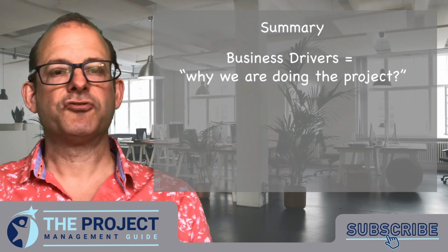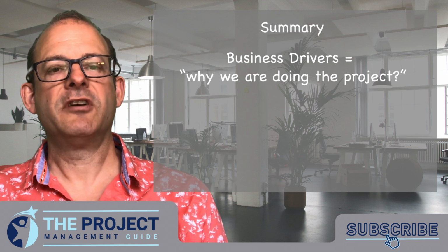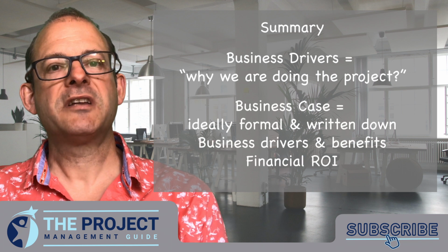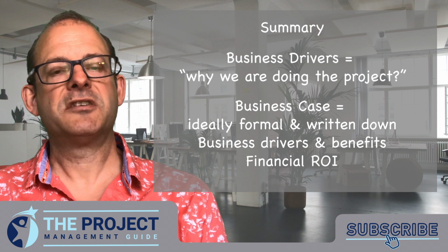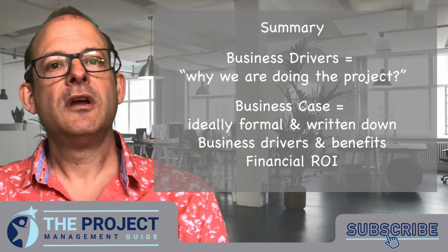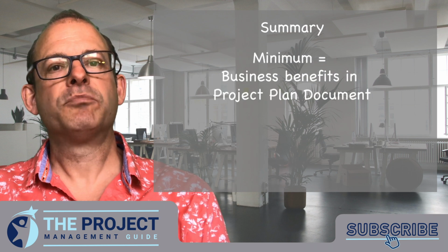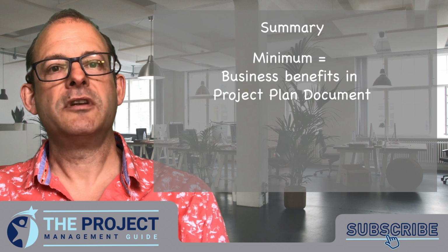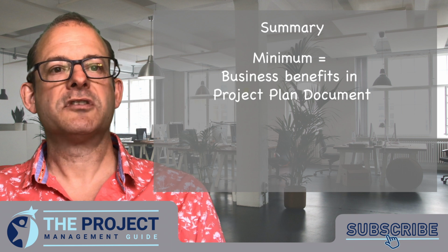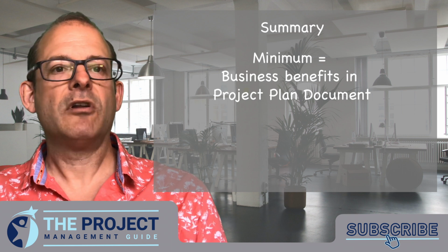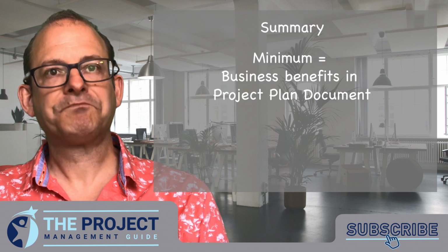So understanding the business drivers for your project is really important. It's all about understanding why we're doing the project in the first place. And you might have a formal business case, which is a written down document outlining the business drivers, any business benefits and any return on the investment, but you might not have a formal business case either. But the minimum you need to have for your project is to have it written down in your project plan document. So you need to outline the business benefits and the drivers and any financial analysis. Outline that either in a separate document or as part of your project plan document.